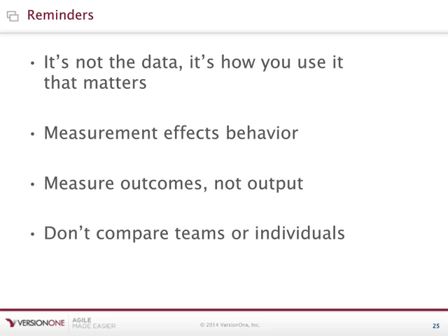And finally, one of the worst things that I've seen anyway is people comparing teams or comparing individuals. Again, it builds strife and animosity. Every group of people is not going to estimate the same way. And so for me to say my team can deliver 10 points a sprint or 1,000 points a sprint, those points may or may not equate to what another team is delivering, even within the same organization.